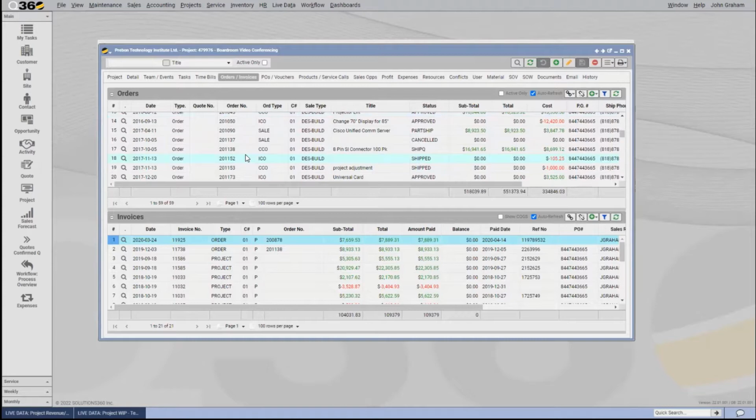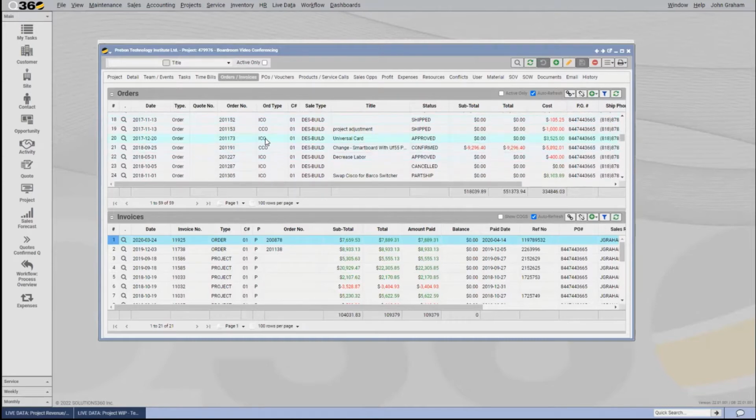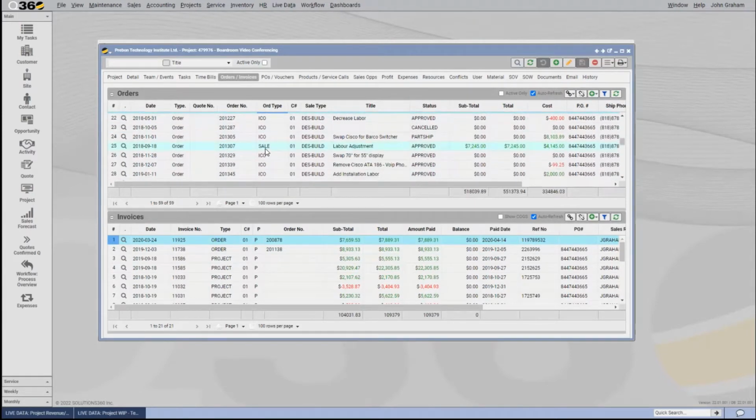Or you may have customer change orders where you have to change the chart because the scope has changed. The customer has changed their scope of work. Maybe they've added an additional building, additional room, or additional scope. So we have all of these various change orders that reflect and impact the financials of the project.